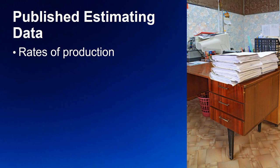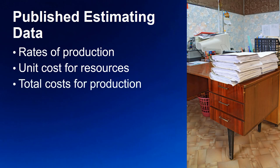Published estimating data is available from industry-based or government-created sources, and having rate information and unit cost together allows you to determine total cost of production for the resources selected. These external publications may be very helpful since someone else has done all the analysis for us.